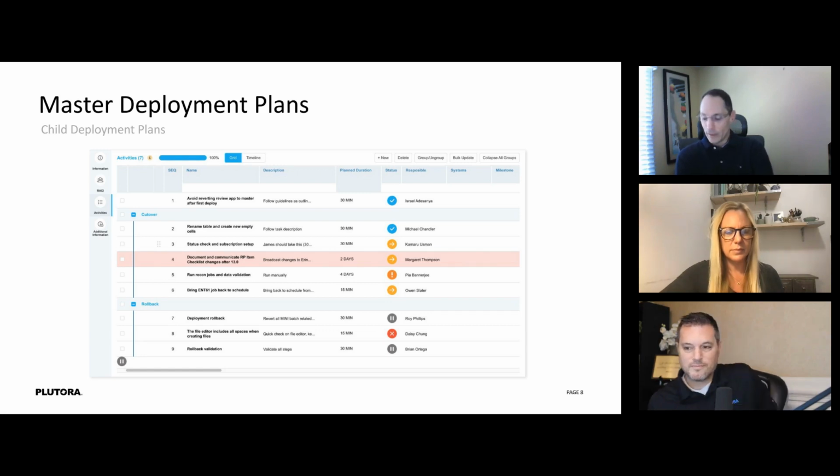And the other side of that is that when you no longer have it in spreadsheets, we've got a dashboard that rolls up 80 applications and 696 discrete activities into one really simple dashboard where we can see where we are, what's on track and what's late. So a little resistance initially, but over time people start to see the value of doing that. The rubber stamping, that's another thing. But as far as resistance to change, I think they understand the value of getting it right. And when we do our retros, they try to learn and improve.